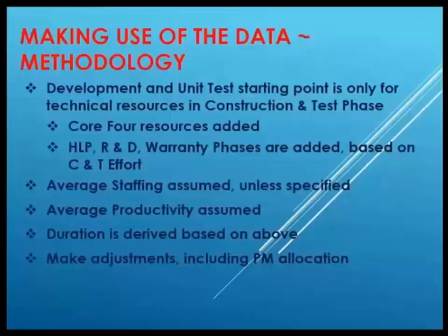In a large organization, usually, again, there could be a constraint on the staffing level, but if there's no constraint, our organization will use the average staffing, and by having that project history, you can do this. Same with productivity. You may need to adjust the productivity, but you can use the average for projects of that size. And the same thing with duration, unless duration is a constraint.